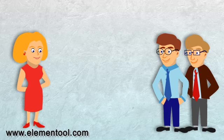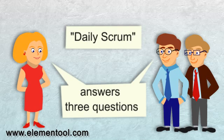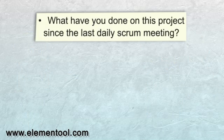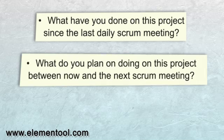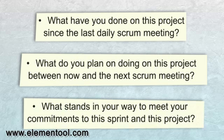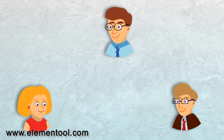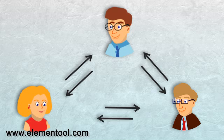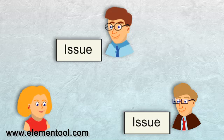Every day, the team meets for a short 15-minute meeting called Daily Scrum. In this meeting, each team member answers three questions: What have you done on this project since the last Daily Scrum meeting? What do you plan on doing on this project between now and the next Scrum meeting? And what stands in your way to meet your commitments to this sprint and this project? The purpose of Daily Scrum is to synchronize the work of all team members and address any issues that might delay the work progress.